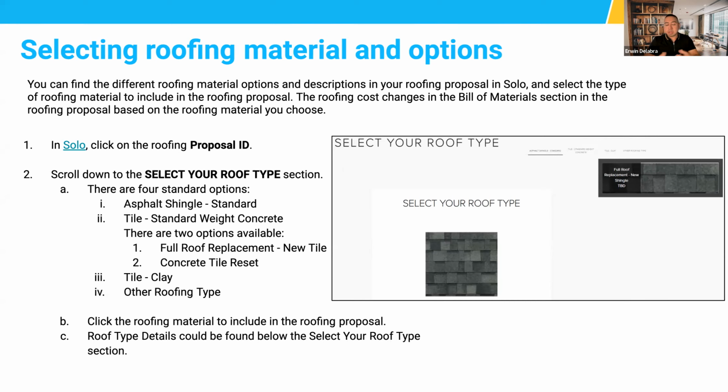So you have two options. Anytime we take stuff off, if there's any kind of damages on the roof that are more than what we expected on the price, you can do one of two things. You can do a change order, have the homeowner absorb those costs, or you can say, hey, no worries, Mr. Homeowner, I'm going to take care of those costs for you, and I'll just eat that from my margin, my commission. So you have two options. It depends on what your situation is with this homeowner and what route you want to go with.